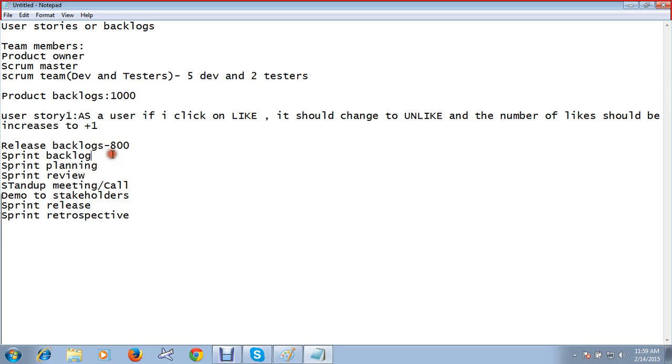Now you're going to develop an application in the form of sprints in Agile. The duration of a sprint is a few weeks actually. It might range from 2 to 4 weeks. So a sprint is just a time period. Exactly, a time period. What I'm going to tell you now is that in my company we are following only a 2-week duration for each sprint. How many weeks? 2 weeks. But it should not last more than 4 weeks.